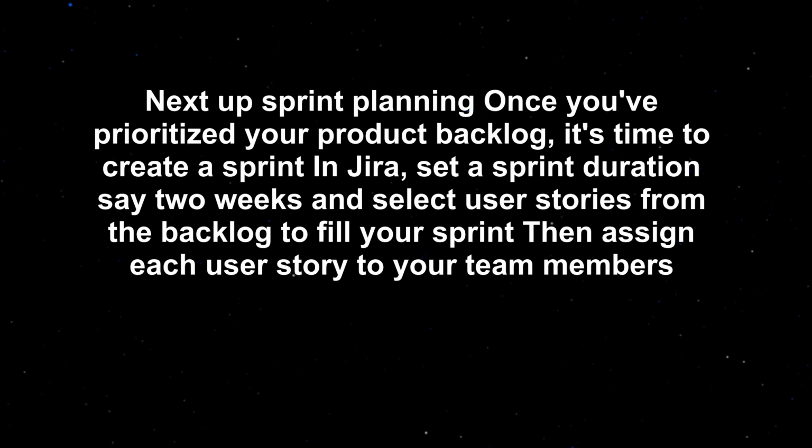Next up, sprint planning. Once you've prioritized your product backlog, it's time to create a sprint in Jira. Set a sprint duration, say 2 weeks, and select user stories from the backlog to fill your sprint. Then assign each user story to your team members.